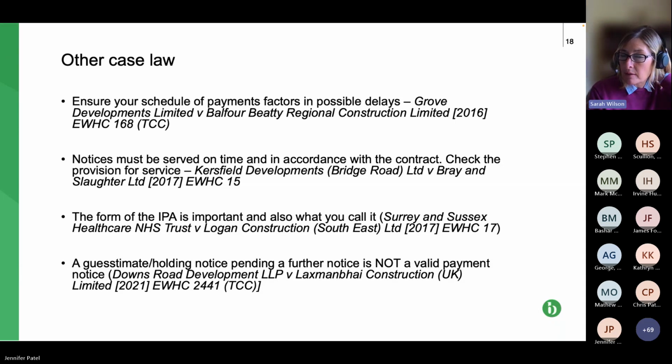of putting things on account, and be careful of saying I'm going to update this later on. And also, I suppose if you're on a receiving end of a payment notice that does that, there's huge potential there that you might be able to claim a smash and grab, and claim that that notice is invalid, and therefore the interim payment application prevails, and that is the sum that's payable.